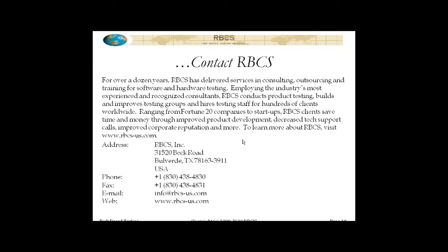Okay, so a question came up in an earlier session of this that I want to address, which is how risk-based testing works with the different life cycle models, where it fits in. So if you're following a sequential approach, like was the case of the case study that we looked at, the pilot, what you're going to do is try to do your risk analysis in parallel with the requirement specification, using a draft of the requirement specification as an input into that process.